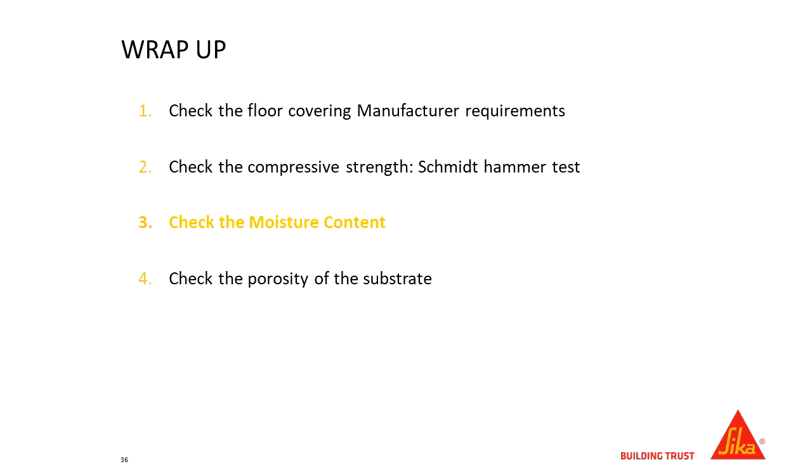And check the porosity of the slab. The reason I have that there is because the best thing, in my opinion, about the SIKA MB and the SIKA MB Redline is the minimal amount of prep that's required. A lot of the competitive products out there will tell you have to bead blast that slab. If it's too highly burnished, you need to bead blast the slab. If you have old adhesive, you need to bead blast the slab. We know that that's a huge cost that's associated on a job site, bead blasting.